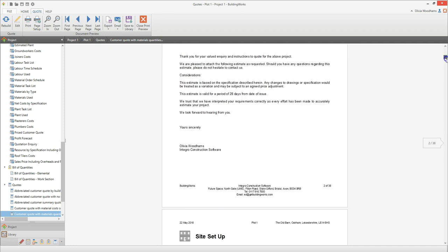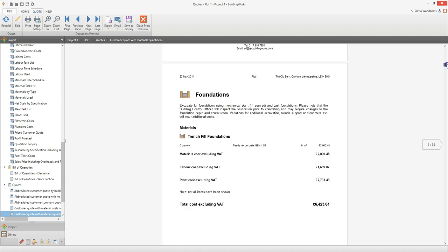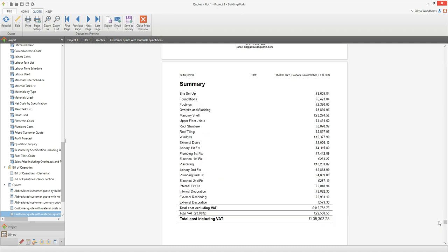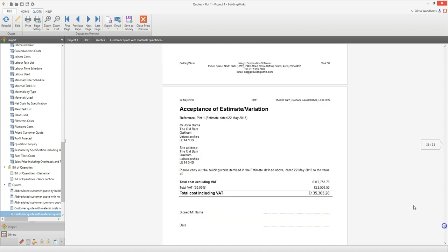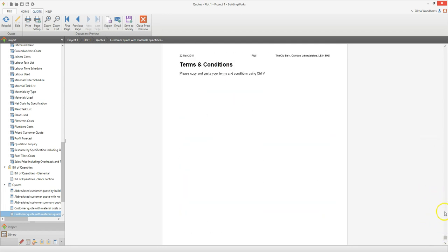The quote includes a default cover letter which you can edit to reflect your company's style. Scrolling down the screen, you'll see that the quote is broken down into build phases. In this quote template you can see line by line quantities and costs for materials, and subtotals for labour and plant. At the end of your quote you'll find a summary, followed by acceptance forms and finally space to include your terms and conditions.